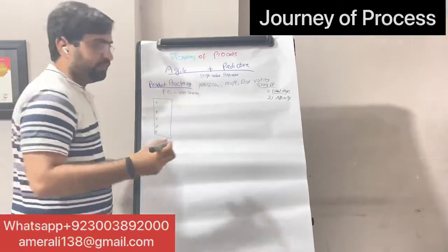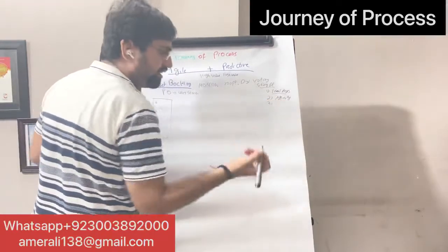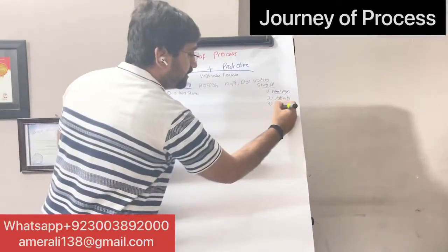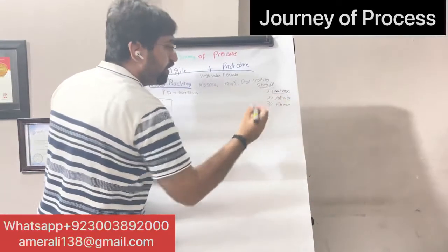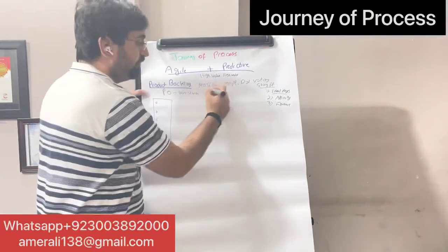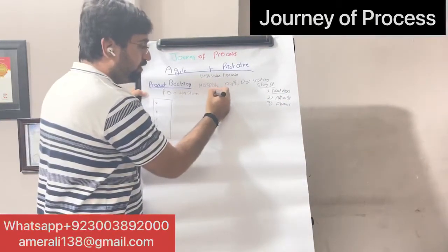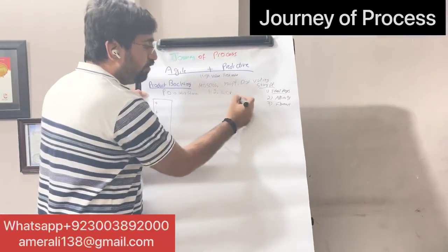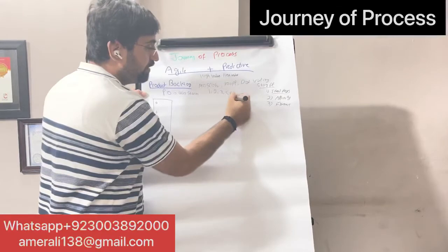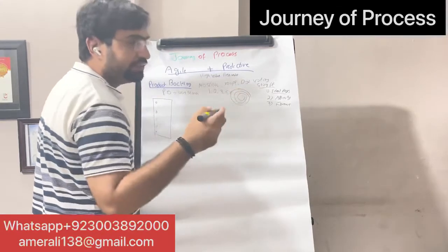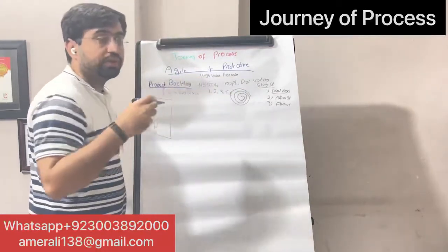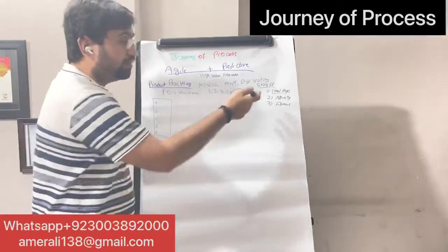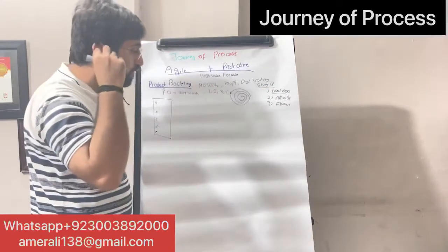The third type of estimation is basically the Fibonacci series. In the Fibonacci series, what do we say? 1 plus 1 is 2, 2 plus 1 is 3, 3 plus 2 is 5, 5 plus 3 is 8. We say that as user stories grow, their effort increases at an incremental level, not at a sequential, linear level. So we use these 3 techniques to assign story points.